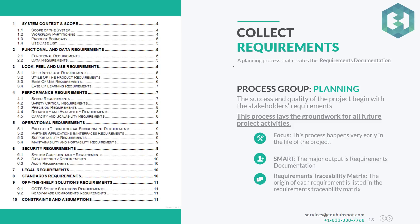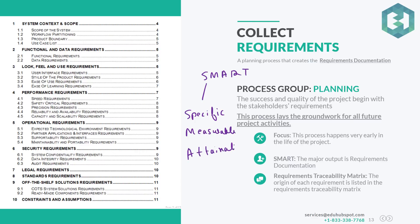This is a planning process that creates the requirement documentation. Always remember: requirement documentation should always be SMART — Specific, Measurable, Attainable, Realistic, and Time-bound.